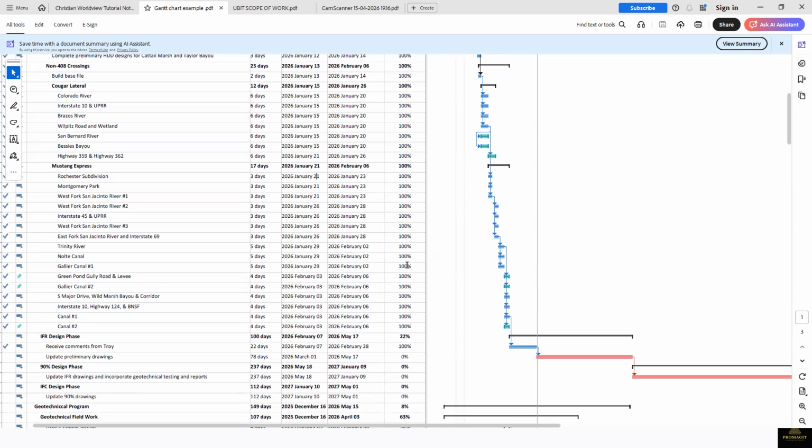Or we are still working on this. Or yesterday it was 20, and it's not something you do on a daily basis. Usually you update maybe on a weekly basis for a small project, for a bigger project could be on a monthly basis. For very big projects, a lot of other small schedules will be available, because other people are working on something and they will have built their own schedule that they will be reporting to you, and based on what you receive on a weekly basis, you can now update your own schedule.